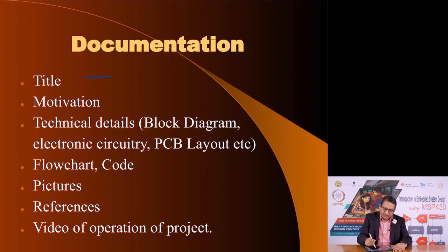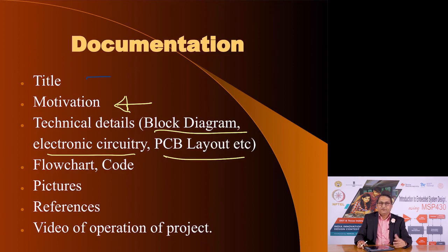You must create this documentation in great detail, and it must follow a certain process. It must have a title, and why you did this, the motivation, why you are documenting it. What are the technical details of this project in terms of block diagrams, circuit diagrams, PCB layout? If it is using some embedded controller or computer, then what kind of flowchart was used to create the system, maybe a record of the code, and pictures, not just of the final form, but as the project was evolving, at various stages. And what are the references you used: was it everything from your own thought process, or did you use any books or internet websites?